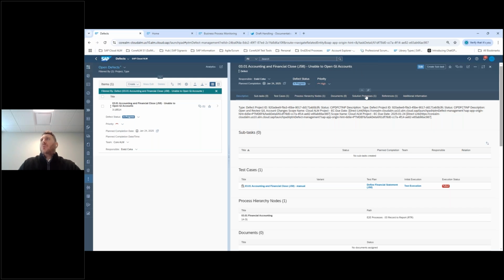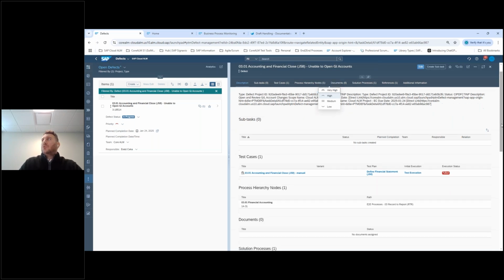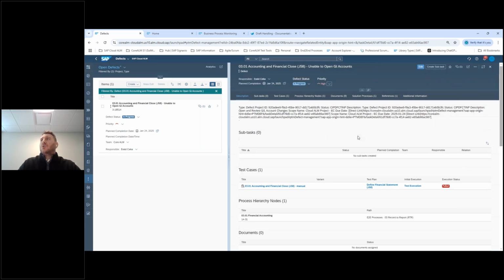And this is what the defect will look like on the defect app. So we're still continuing with that traceability. We can assign owners. We can track those defects by status. So if you're having a defect triage call, you can use the tool directly, and that will help you run a successful meeting by looking at all the defects, tracking by statuses. You can also see assigned priority. So if it comes to a point where you may have 10 or 15 or 20 defects, you know which ones to work on first. So you are spending your largest effort on those defects that are most important.